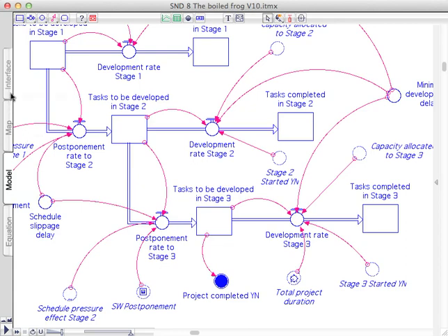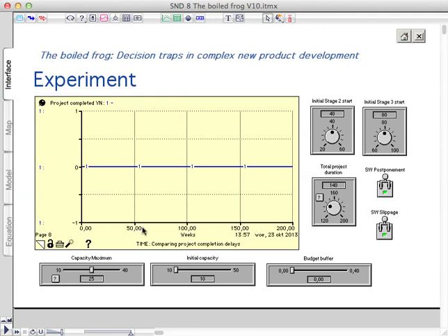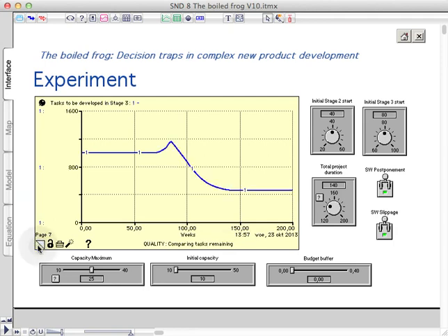Okay, so what do we get then? Well, one of the first things that I would like to look at is what happens if we forget about the postponements. If we forget about the postponements, that means that in this case no extra work is delegated to the next stage. You see that there is indeed not an increase here in the work for stage 3, and that's beneficial. It doesn't look like so much, but still we no longer have 460 tasks, we have 406 tasks.